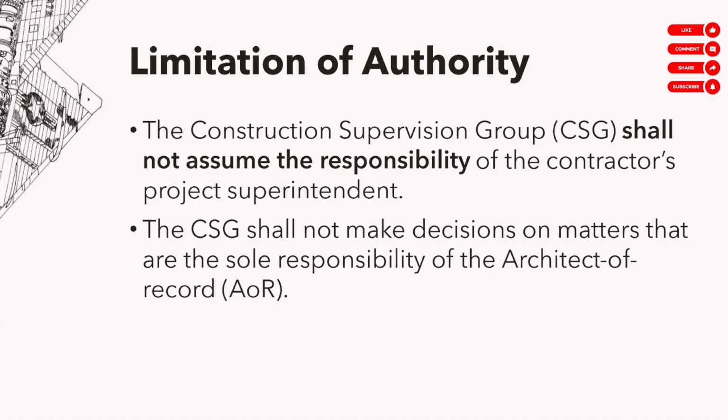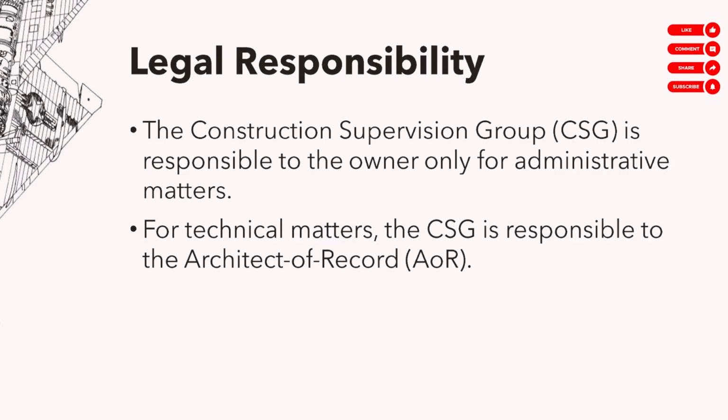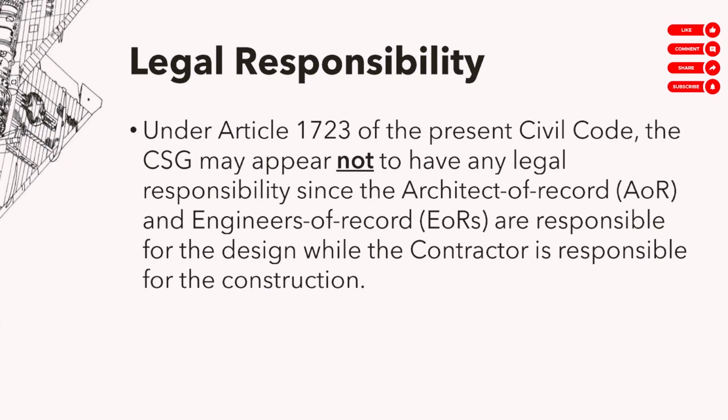There are things that should be referred to the consultants, and the CSG obviously is not in the position to be deciding on those things. Design issues mostly. Okay, hindi pwedeng yung CSG ang nag-decision. Legal responsibility. Okay, the CSG or the full-time supervisor reports to the owner for administrative matters, but for technical matters, the full-time supervisor or the CSG should report to the architect of record.